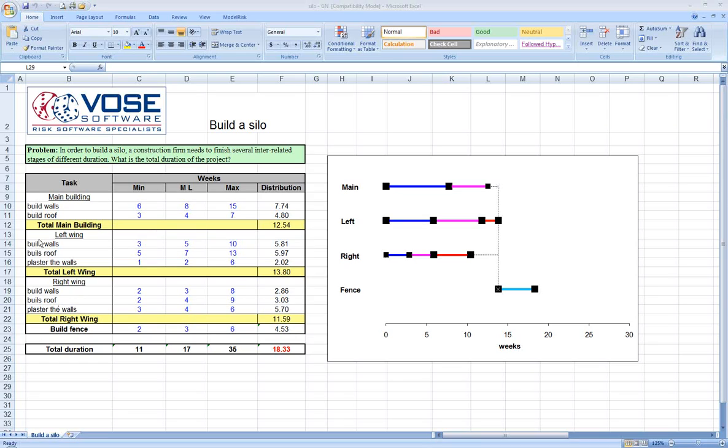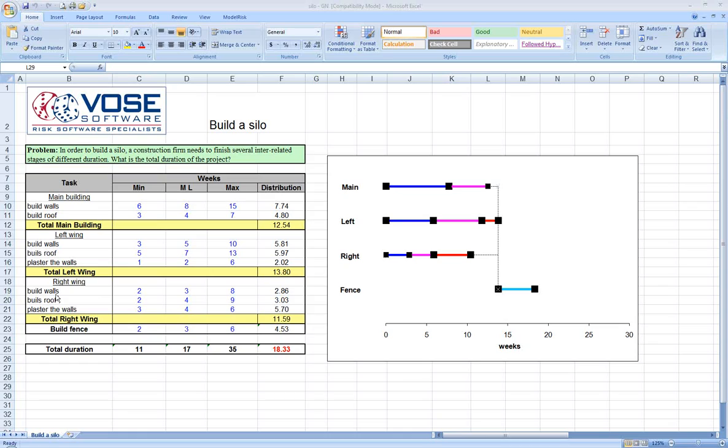The main building, left wing, and right wing can all be constructed simultaneously. However, the fence cannot be built until all three main pieces are completed. Within each main piece, there are also subtasks—building walls, building roofs, etc.—that must be done in sequential order as listed in the model.